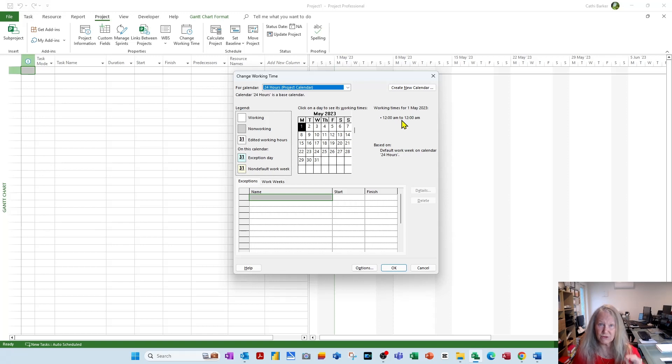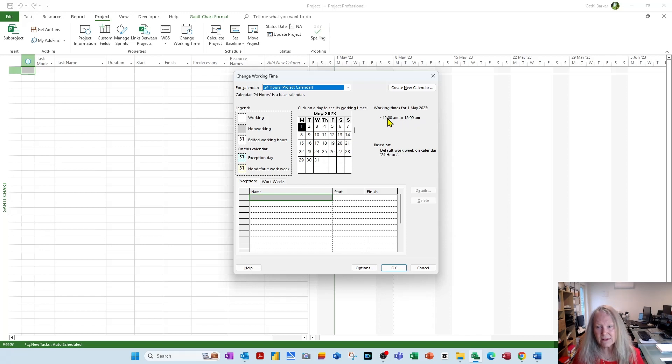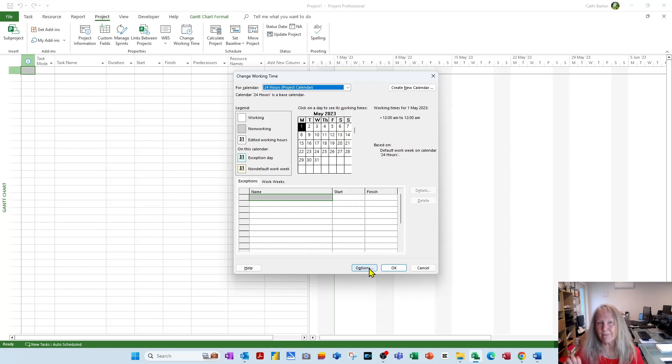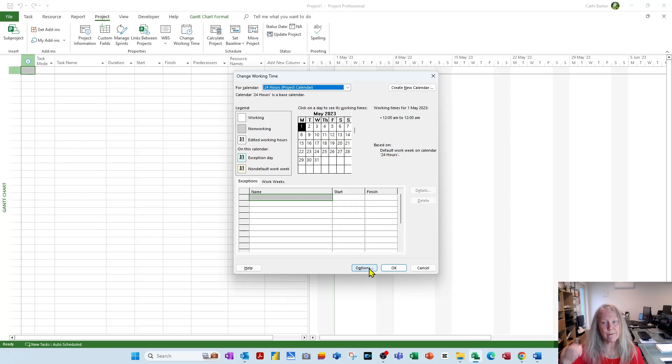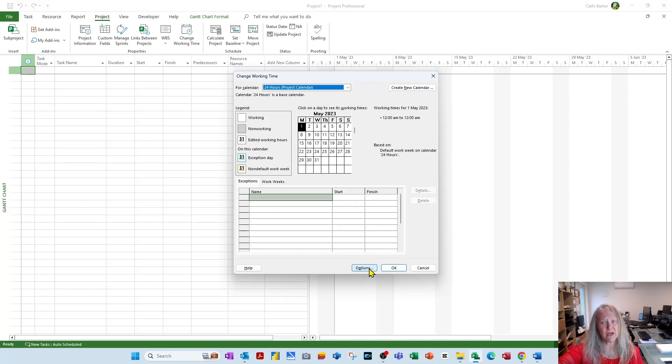But the trap for young players is, despite the fact that this is perfect, what's in the Options button may not balance with what you've got in here. When you click the Options button, the start time must be 12 a.m., the end time must be 12 a.m., and the number of days you work a week must be 7, so they have to balance.